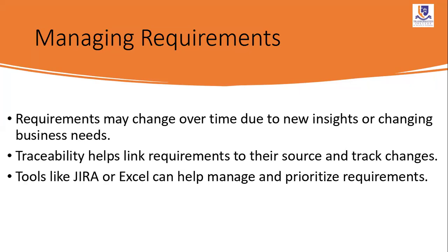So traceability helps you link the requirements to their source and track changes. So with proper documentation, you now see what has changed. You trace it for you to be able to apply the necessary changes that is expected without having to mess the project up. That's why your documentation, your interview sessions, your documentation, all of these things need to be very, very clear. I believe as BAs on this call, we are good at using Excel.